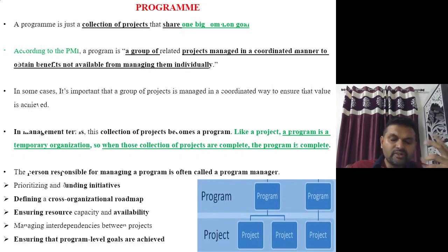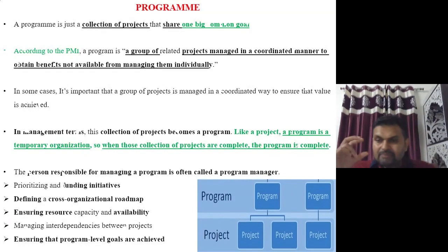So at that time, the main formwork is going to be required. So the company should go for a new purchase of the material? No, because there is already one project in which the maximum formwork has been used, since all the RCC work has been done in the third project, right? So that material can be shifted to that site. Then there may be some kind of expertise work.